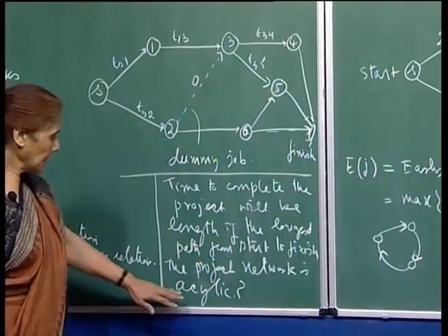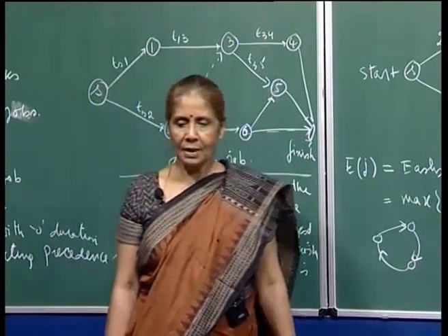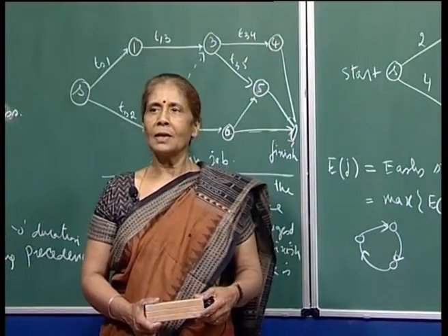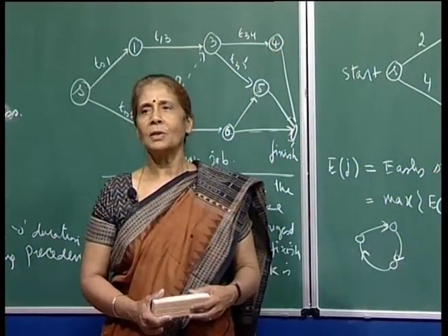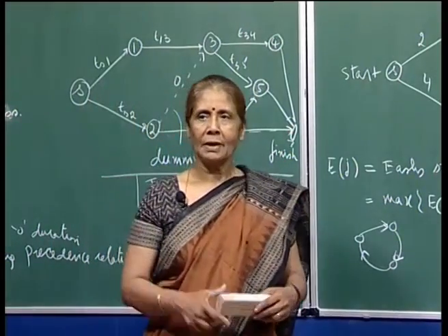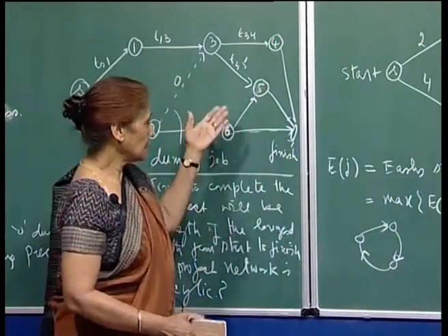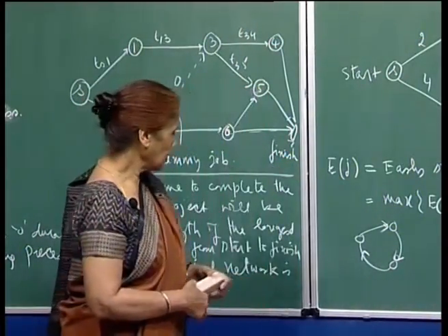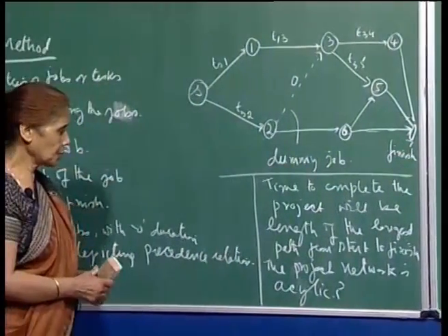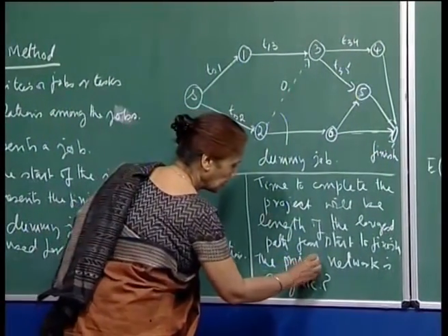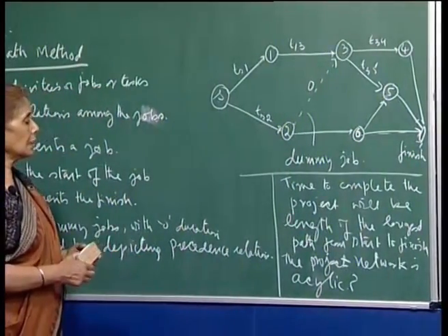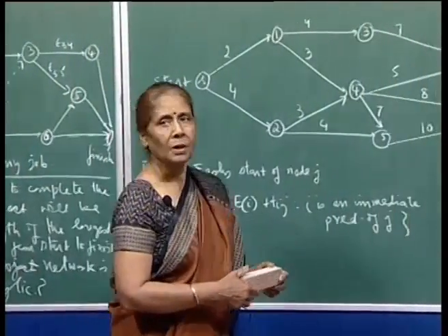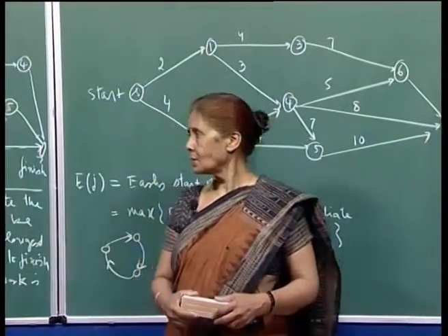Once you know that the project network is acyclic, there is no question of a positive cycle being present in the network, and therefore longest paths can be found. You can just take the minus of the Cijs, or here the Tijs, and apply the shortest path techniques to find them. Now, just to show you a few computations of how we find the longest path: because the project is acyclic, finding the longest path becomes very straightforward, and I will show you that by simple labeling.